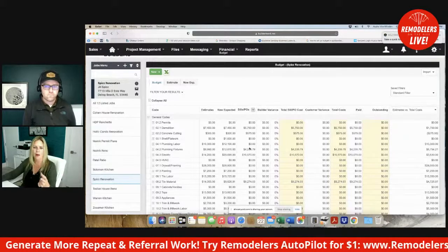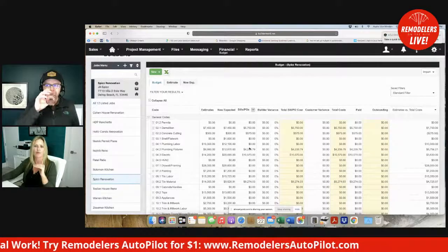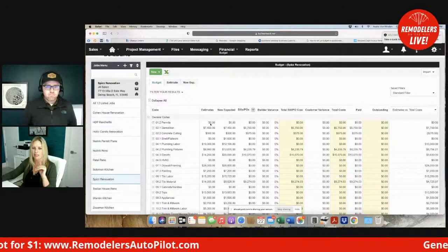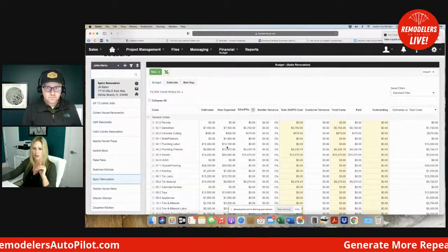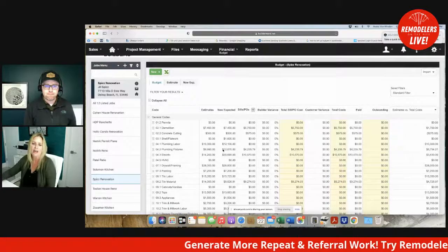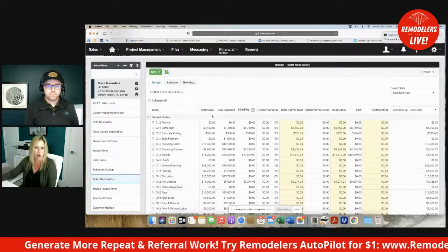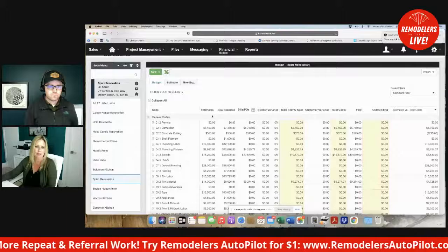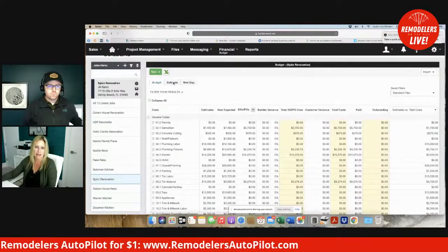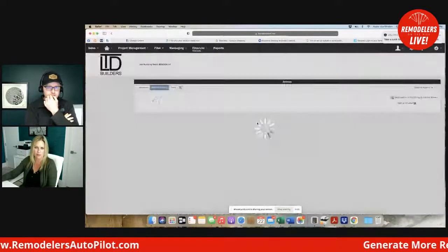BuilderTrend has an interesting way of tracking that job running total. And so what we figured out right away, I have an assistant who handles a lot of the budgeting stuff. She figured it out first and explained it to me, which was great. But when you set this job up as a job from a proposal, your estimate gets imported, and that's what goes here. And there's this estimate tab here. This is your proposal. Literally verbatim, this is the proposal.